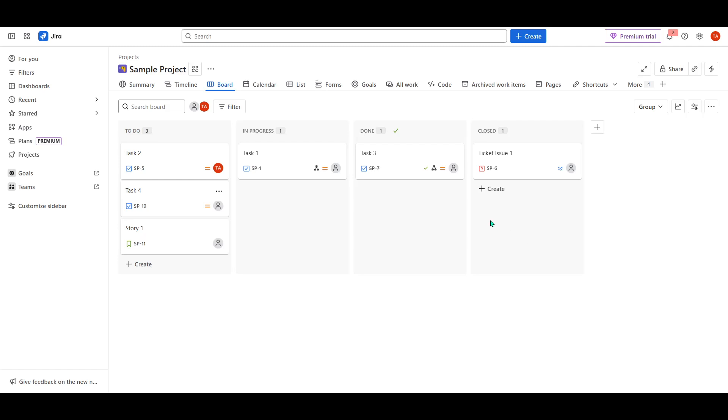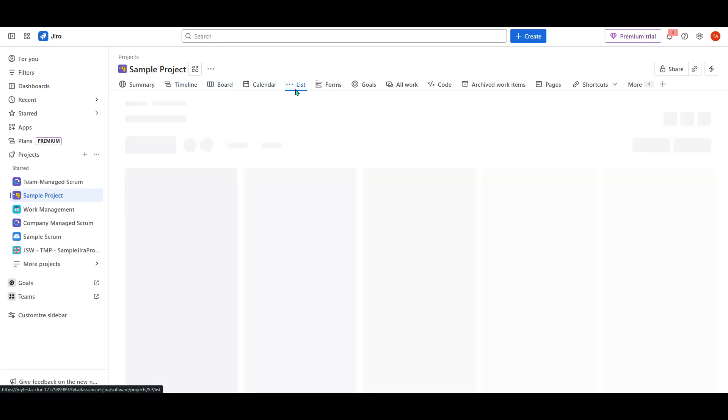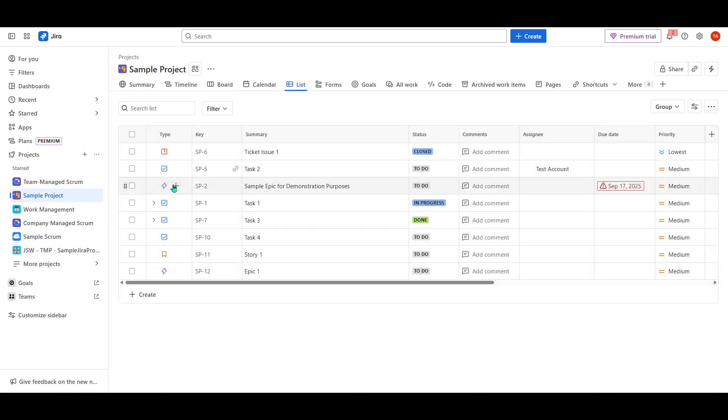To begin, you'll need to navigate to your Jira project and locate the specific epoch for which you want to create new stories or tasks. The epoch acts as a container for your project milestones, enabling you to organize related stories and tasks efficiently. Once you're in your project, find the epoch by looking through your existing list of epochs or using the search function to bring it up quickly. When you've found the correct epoch, go ahead and click on it to open it up.